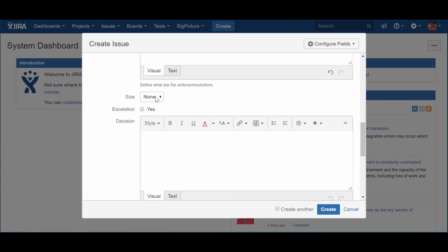The attribute size is used to represent a relative measure of size that makes sense when compared with the existing ones. Assigning sizes independently without using other change requests as a reference makes no sense and makes this attribute useless. As explained in one of the next videos, change requests will be linked to other types of items that represent the work that needs to be done. You can explore those in order to get a more detailed idea about the effort that is involved and use that information to help you assign a value for the size, but always when comparing to other change requests. After all, this is a similar exercise to the one that you perform when, for instance, you're estimating stories.